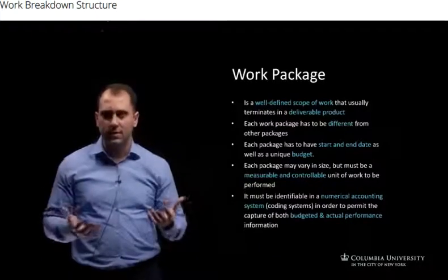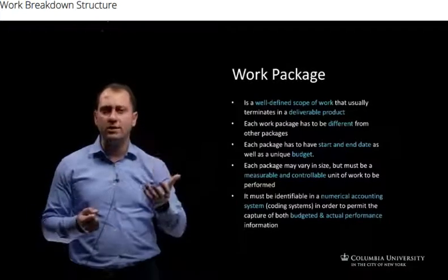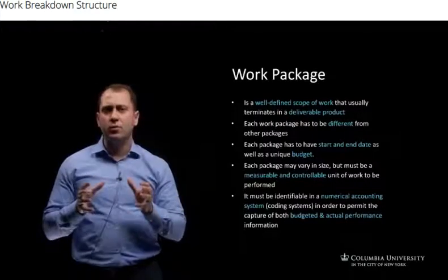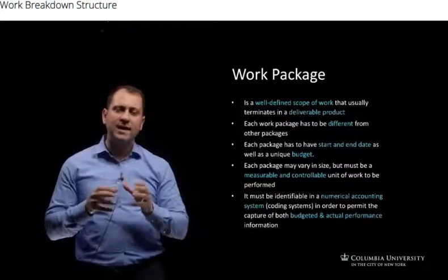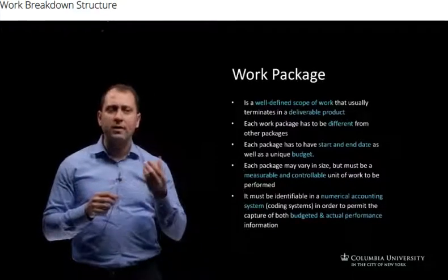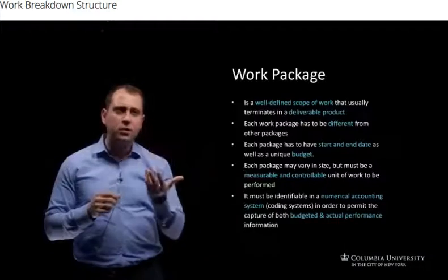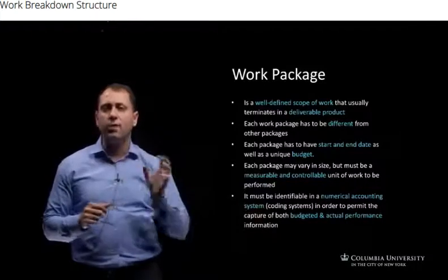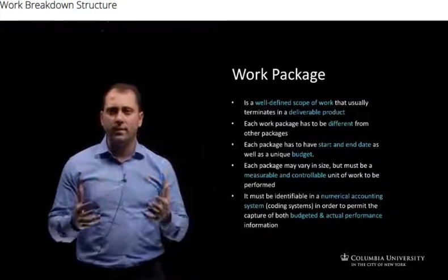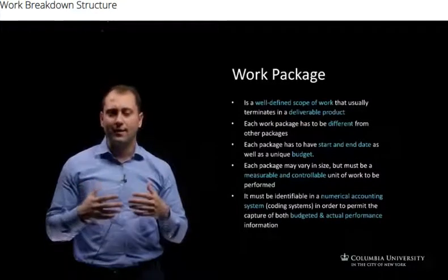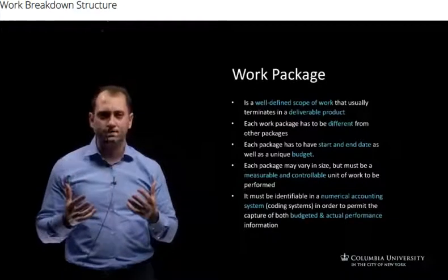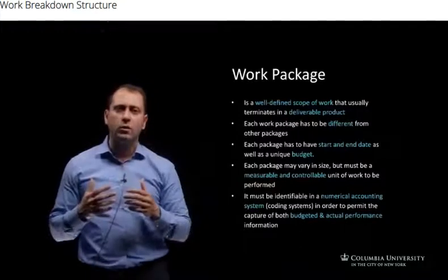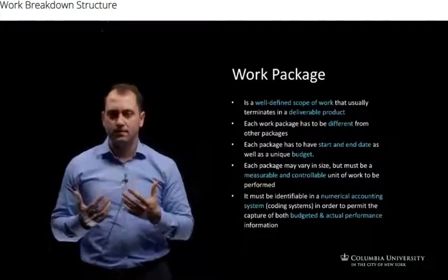And there are 2 types of coding system. There is a standard coding system and there is a project coding system, which we will be covering later in other modules. But why is it important to be able to identify that specific work package? So that we can refer to the actual budget used in the work package and the actual performance inside, for more information about how we are performing on the project and our monitoring for the project. And this also, we will be covering in this course through what we call the earned value method, the EVM.